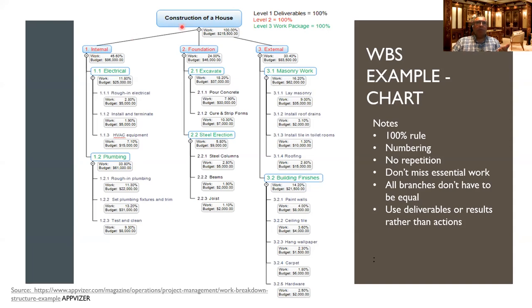But keep in mind that the purpose is to show 100% of the work. 100% of the work in the house? Is there some work to be done internal, some foundation, and external? You obviously first need to do the foundation. In the foundation, two main things to do: excavate.